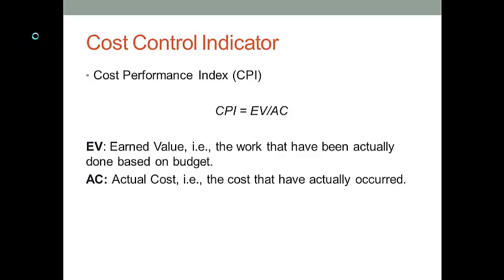You want to keep a very clear view about how much money you have and how much is being spent. In practice, employees will never get reimbursed until a project manager has reviewed and signed on their reimbursement applications. The reason is, the project manager wants to take full control of the most important financial resources. In my opinion, this is a very good management practice. You want to integrate the same process into your management.